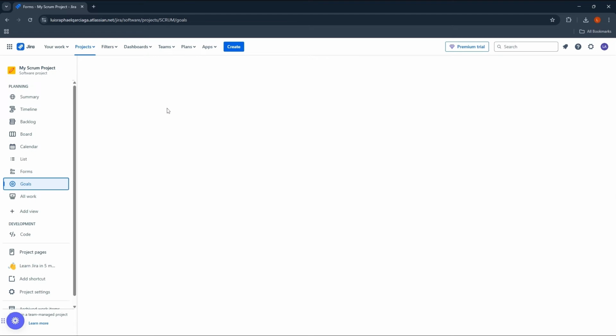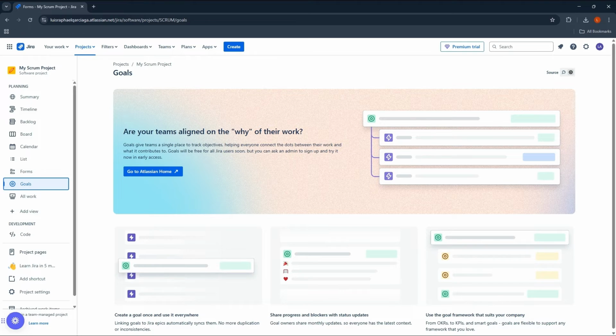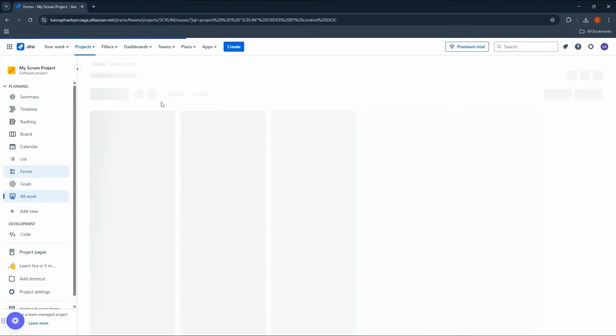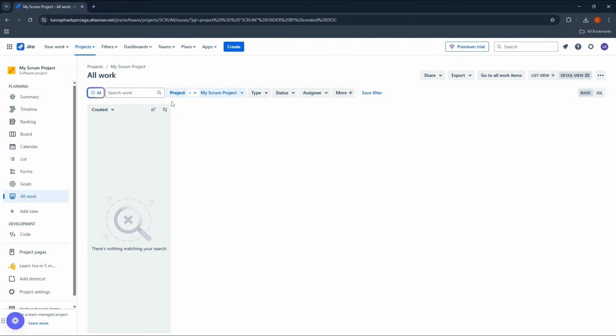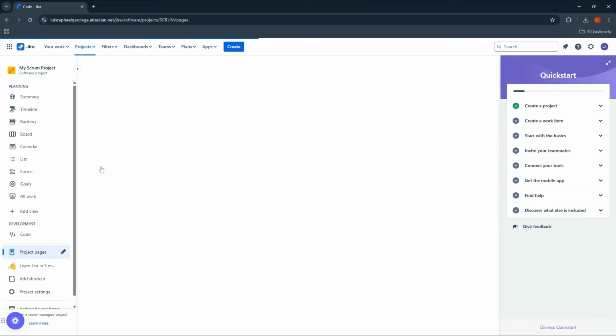If a team member needs to modify a work log, they can click on the edit icon next to the work log entry. Update the time, description, or other details, then click Save to update the work log. 3. Approve work logs. Depending on your permission settings, work logs may need to be approved before they are finalized. Go to the Tempo timesheet section of the Jira issue or project to approve the log time entries.